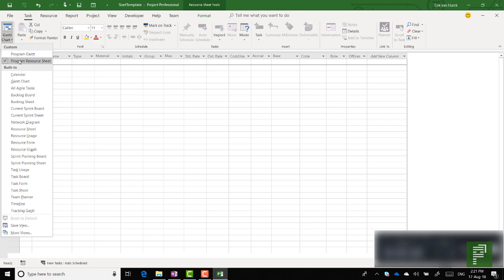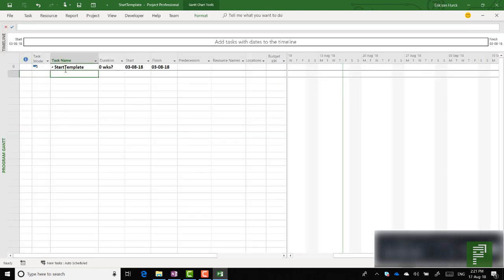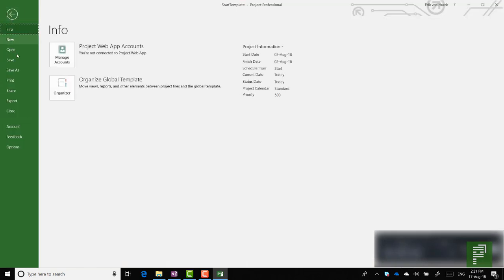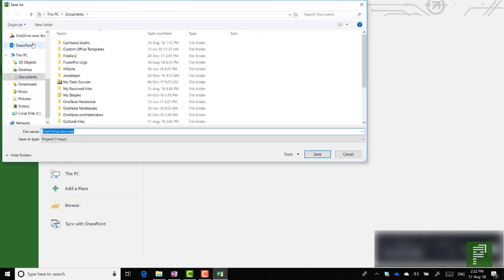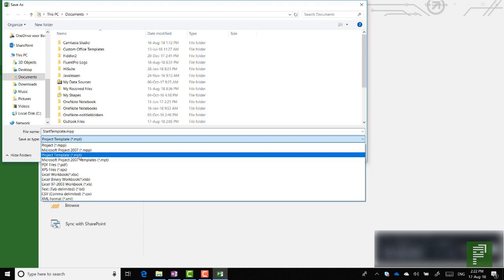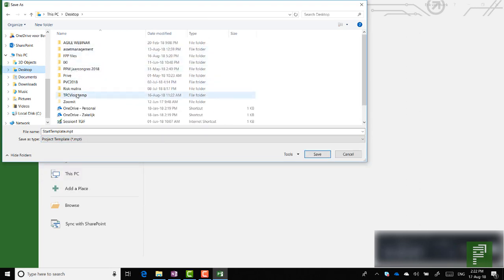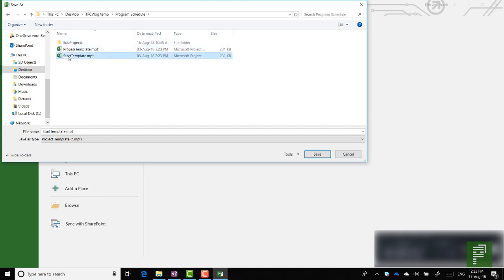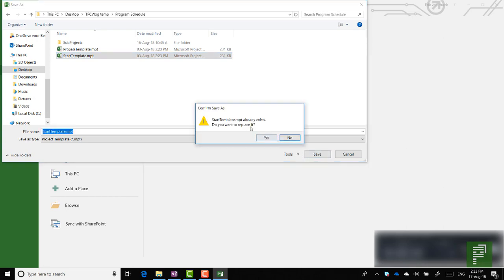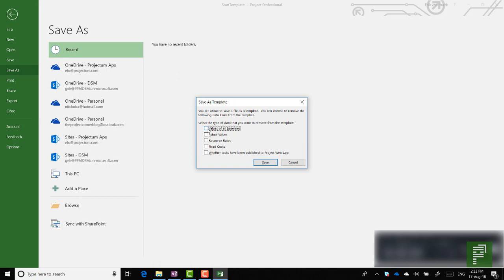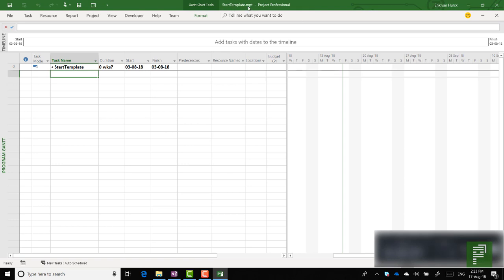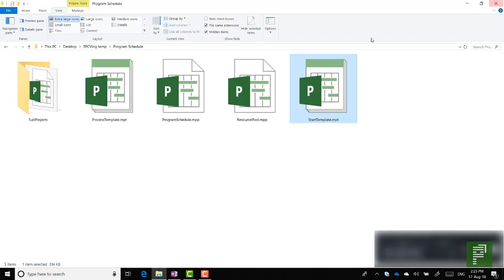Let's head back over to our Program Gantt, which will be the basis of all our schedules. This is the basic setup for any template. We're going to click on File, head over to Save As Browse, and save it as a Microsoft Project Template. I'm going to do that on the desktop where I have my files and override the existing start template. We get to see an option to save certain items within the schedule, but we don't want actual baseline values, resource rates, fixed costs, or published status. Let's click Save. This is the start template .mpt file and we're done with the start template.